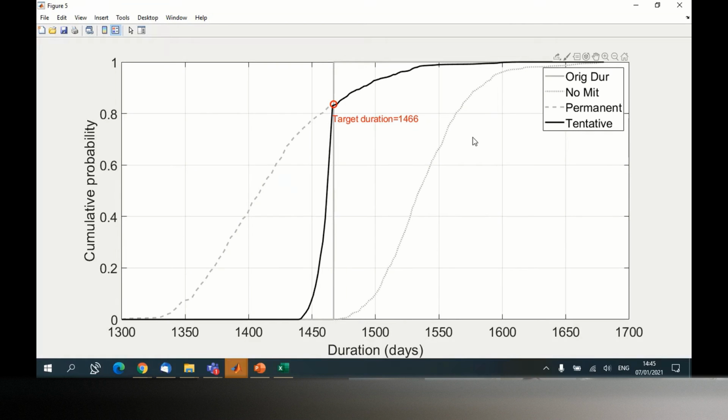For example, in one iteration, risk number 3 and risk number 7 occur. So they are included. In another iteration, risk number 10, 15, and 14 occurred. So they are included. Okay? Yeah, with the Monte Carlo simulation. But risk is always included in all of them.